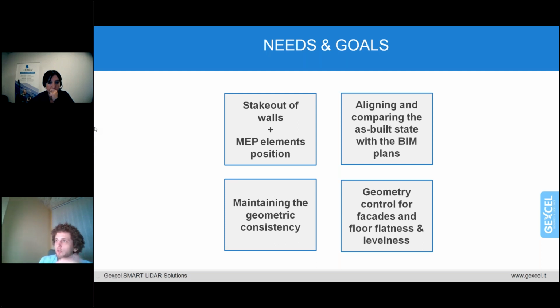On certain occasions, when the deviations are too high and really out of tolerance, even the positioning of the consoles of these composite outer surfaces has to be readjusted and reconsidered. If this happens during construction, the time loss and money loss is really hard to calculate, because you are losing time, you do not know how much.